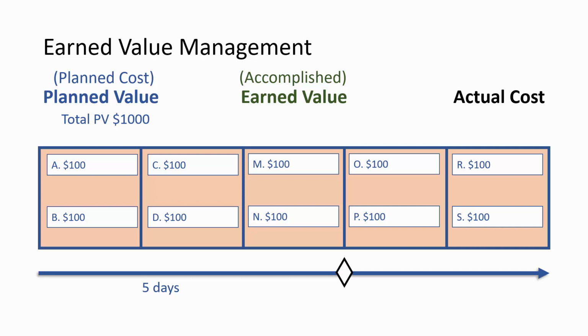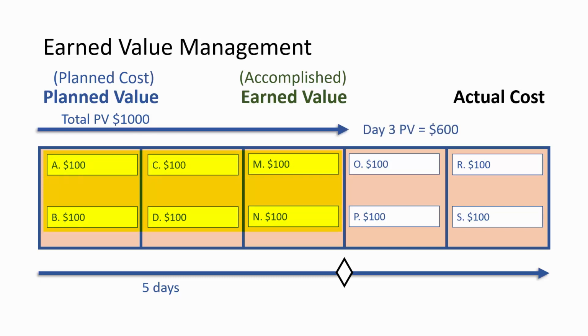After 3 days, project manager stops by to check in on things. So far, project manager expects to have $600 of work performed. That is the day 3 planned value.